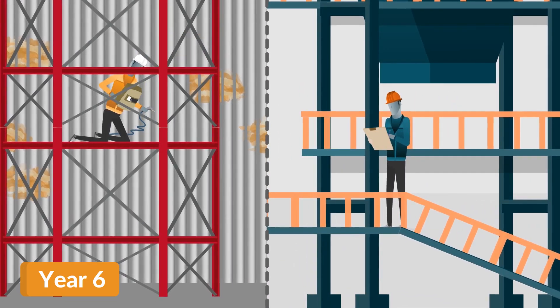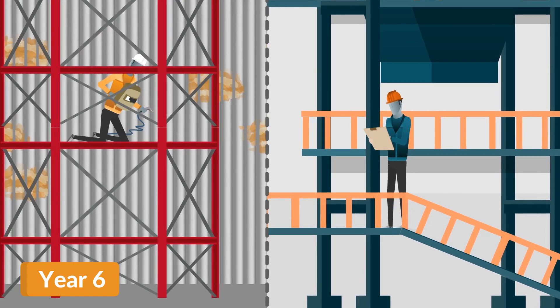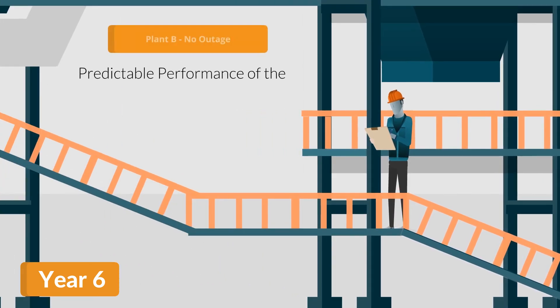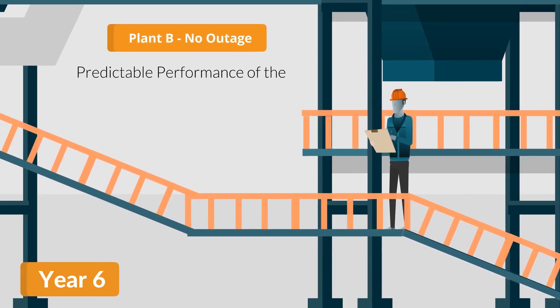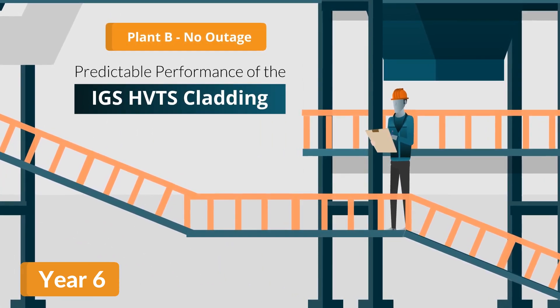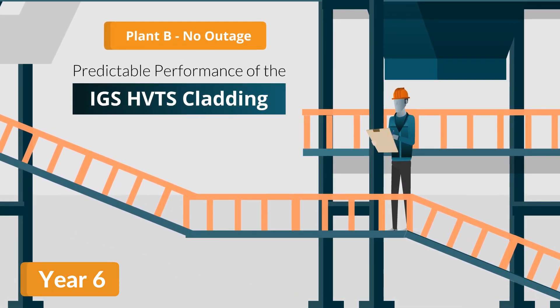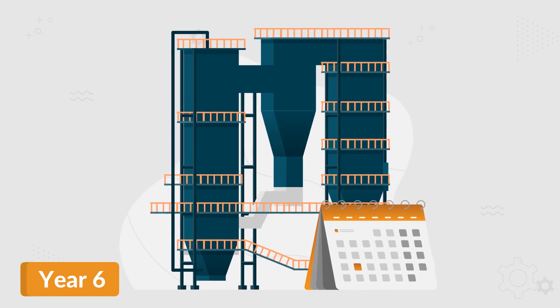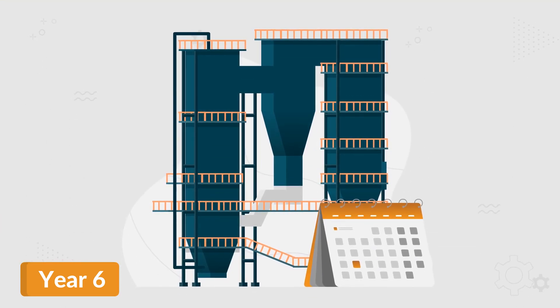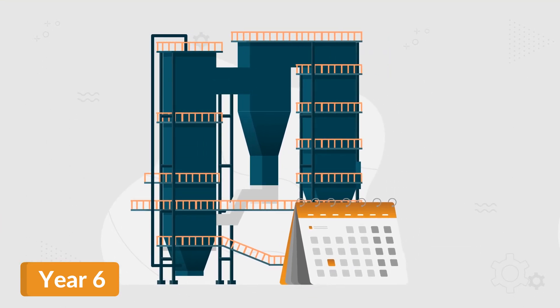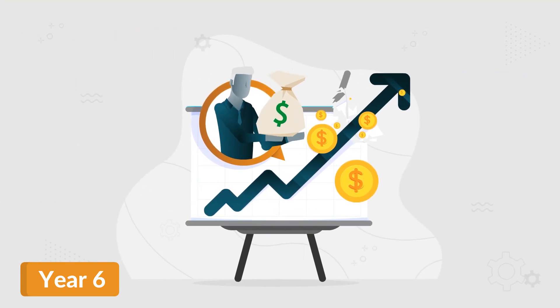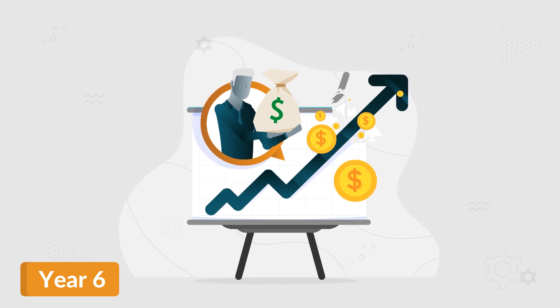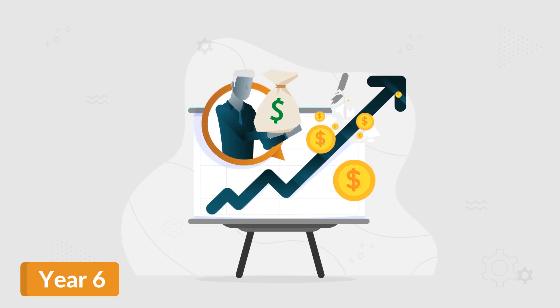At the same time, Plant B skips an outage due to the predictable performance of the IGS HVTS cladding. Deferring their annual maintenance outage puts them a quarter above their baseline profitability.